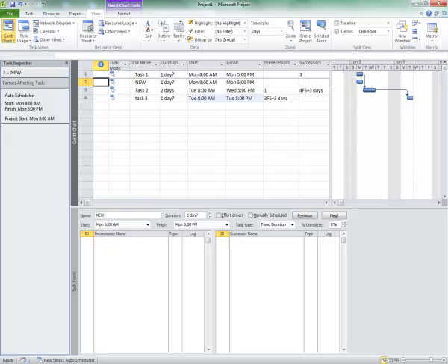Okay, so that was one of the first things to cover. We now know all about the different types of durations, and you've learned how to split the screen so you've got a task linking dashboard. The only thing that leaves is the different task linking types. There's 4 of them, which makes sense. There's 4 different ways to link a task. And what always throws everybody is finish to start is the baton effect. The runner before me has to finish before I can start. And most people go, well, don't you do things start to finish? No. Task schedules are finish to start. That's the common link type.